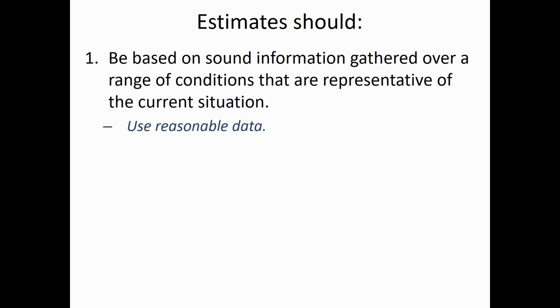And so there's always going to be situations where maybe the cost data you have is old, and between then and now there's been a lot of inflation. And so those old cost data that you're using to project the new project costs wouldn't be representative of the current situation. So you need to use reasonable data that's reflective of what you're going to experience in the project itself.